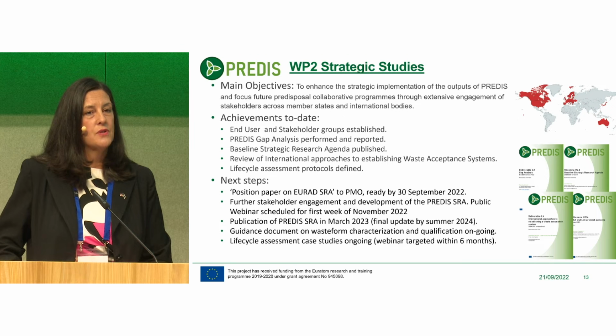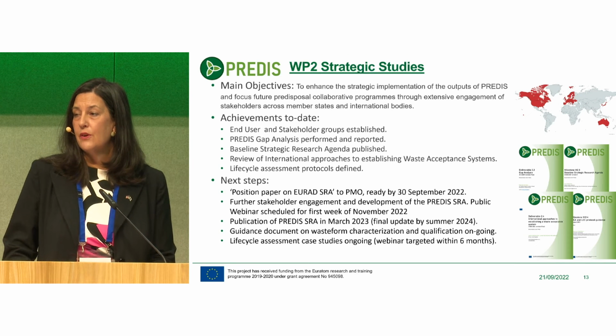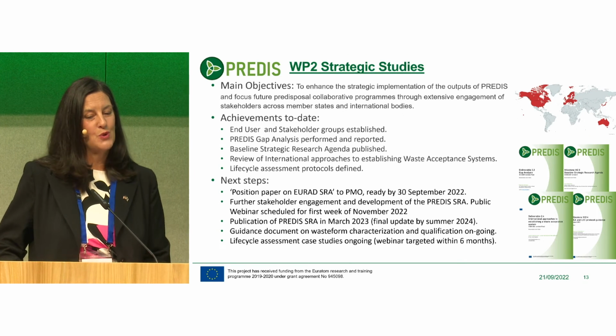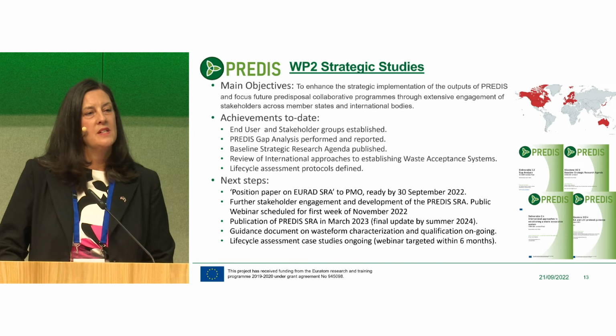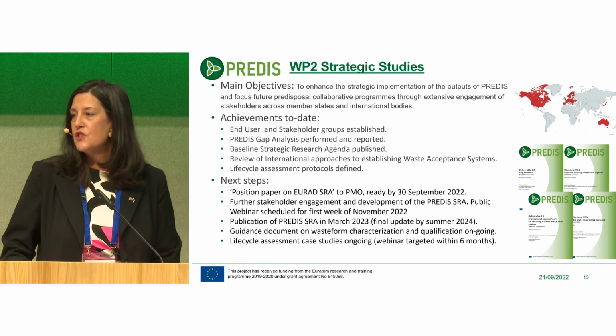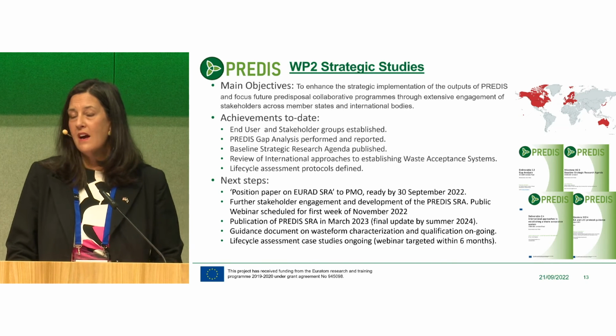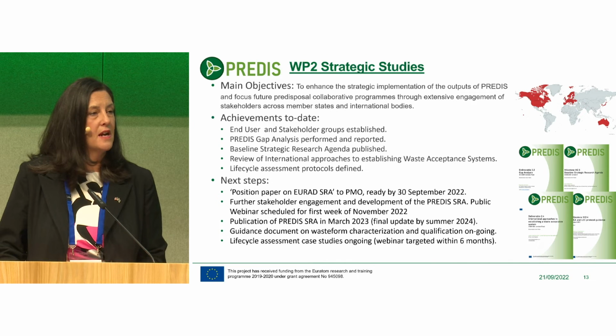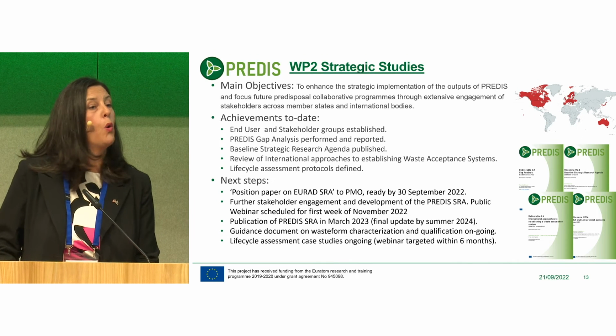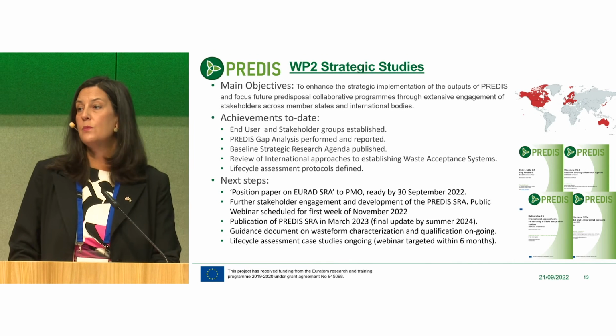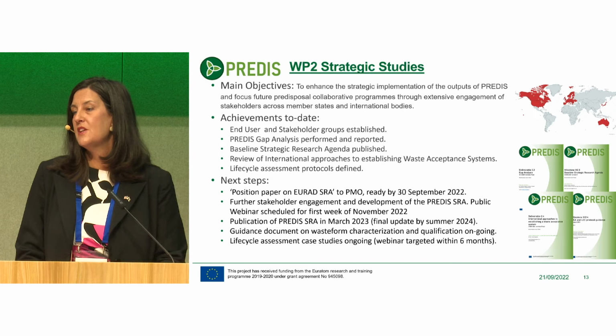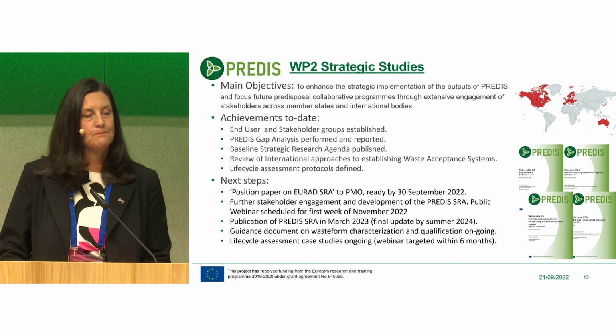So we really make sure here in this work package that we're having good communication and understanding the who's who in the industry. We did an extensive gap analysis in the first year, where we gathered a lot of feedback from all different stakeholders to understand, what are the priorities, where are the holes, where do we see the best room for improvement and optimization in these pre-disposal aspects.